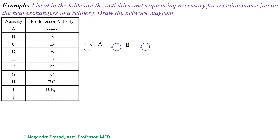Next, observe activities C, D, and E. For these activities, B is the predecessor activity, which means after completion of B, C, D, and E will start. So draw the activities C, D, and E.